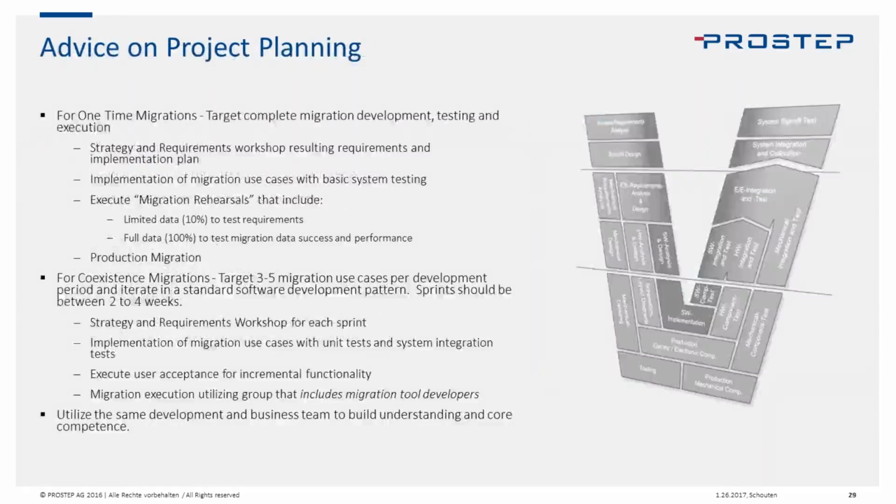A little bit of advice on project planning. For one-time migrations, make sure you start with a strategy workshop. Make sure you have all your stakeholders there. Test all those basic migration use cases with system testing, after they're developed. Execute what we call a migration rehearsal.